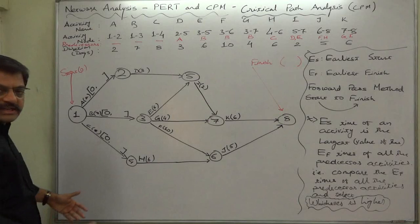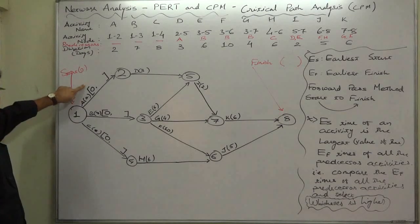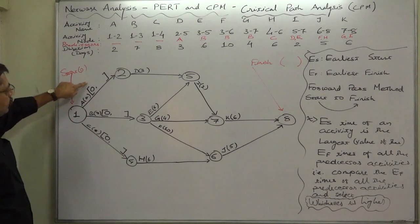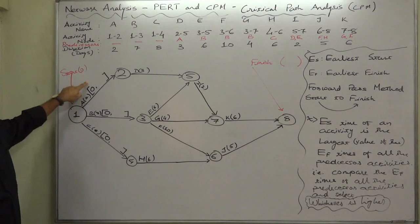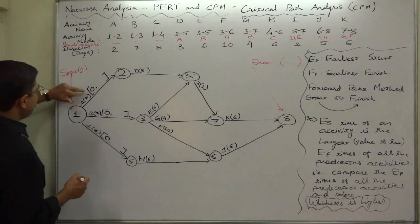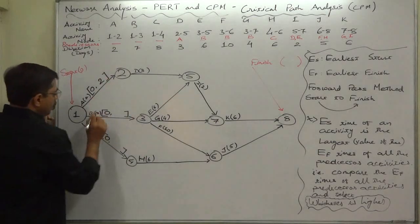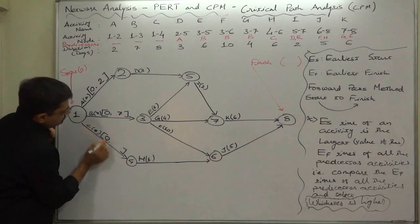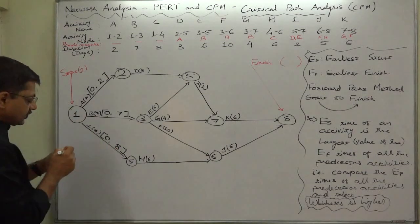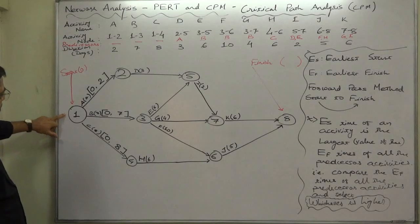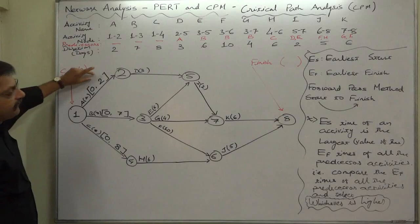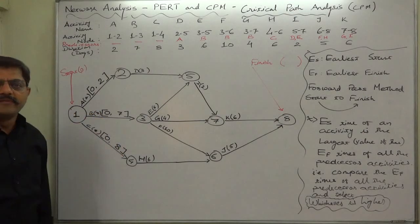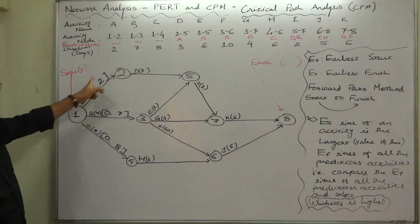The result is earliest finish time — at what time, at the earliest, the activity can be finished. It is very natural: add the duration to the start time, the result will be earliest finish time. So for A it will be zero plus two = two, for B it will be zero plus seven = seven, and for C it will be zero plus eight = eight. That means after starting the project: A will be finished after two days, B after seven days, C after eight days. These are the earliest finish times of these three activities.